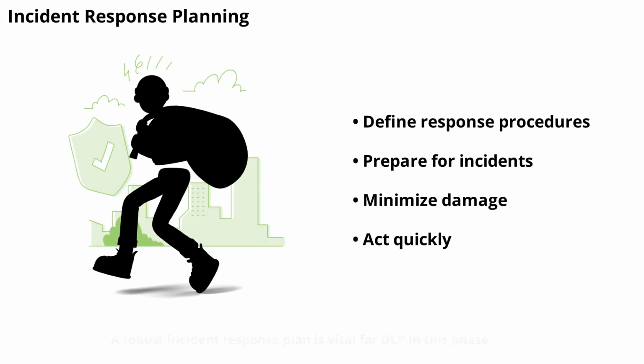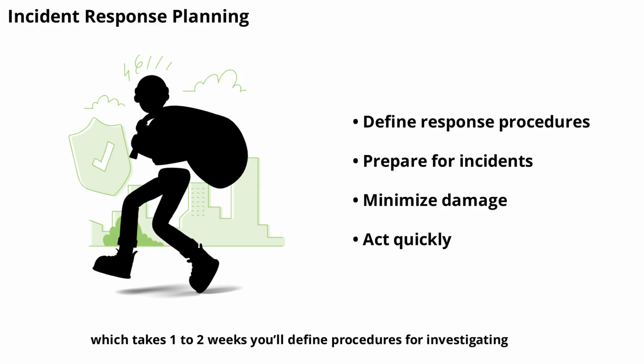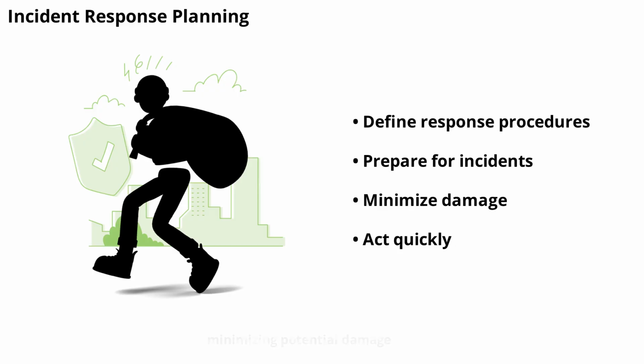A robust incident response plan is vital for DLP. In this phase, which takes 1 to 2 weeks, you'll define procedures for investigating and responding to DLP alerts. Clear response plans help your team act quickly and effectively if a data loss event occurs, minimizing potential damage.